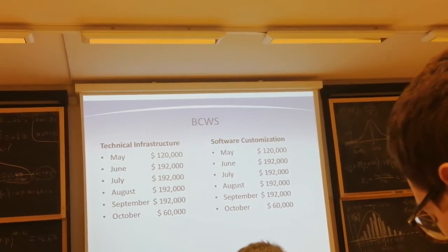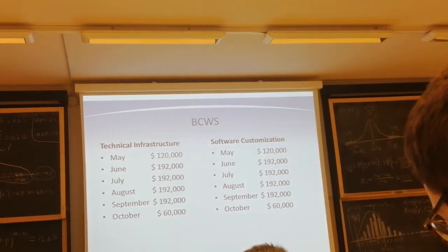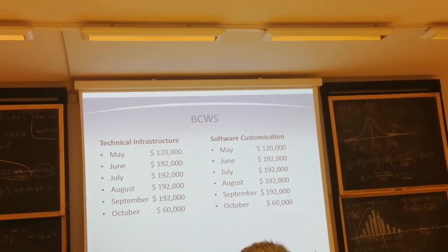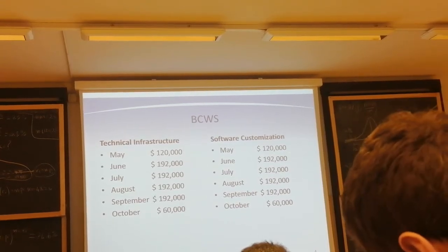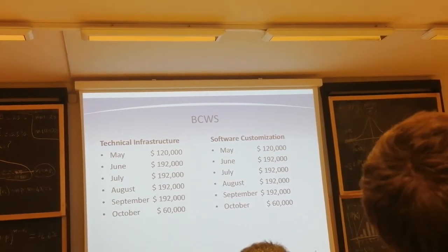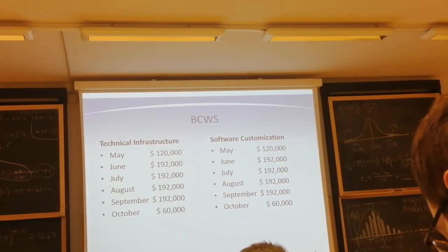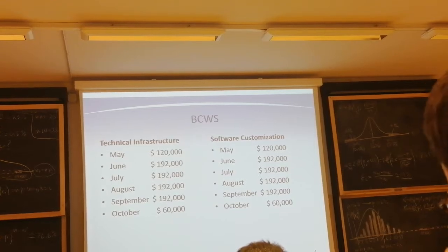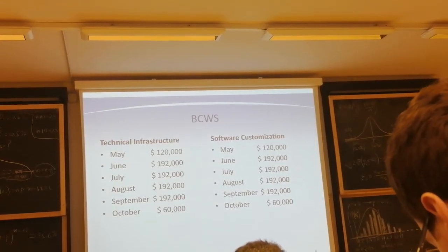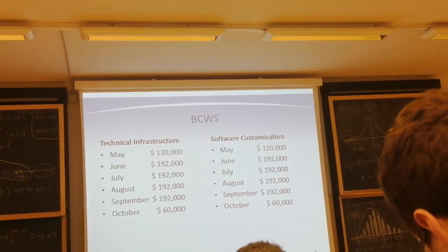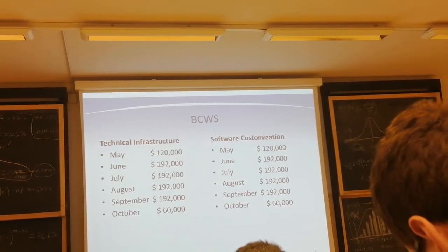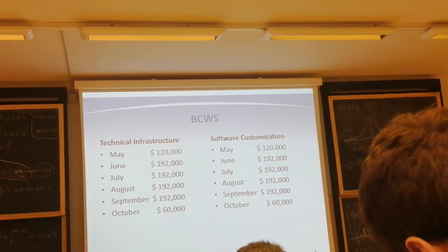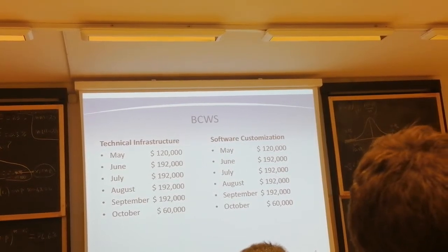BCWS. The budgeted cost of the work schedule, is it cumulative or not? Is it cumulative? No, it is not. So, as engineering management students, masters, or close to be masters now, when you look at those data, it comes very clear to everyone that this is non-cumulative data. So if you would like to understand how much cost accumulates over time, you need to do the rollout. So you need to accumulate it.